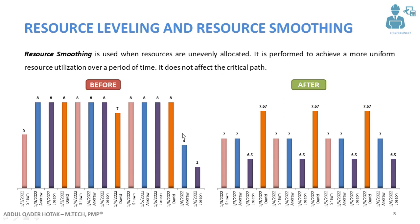Those three hours are added to the four-hour day, resulting in seven hours here, seven hours here, seven hours here, and seven hours here. The same is done for all other resources, so that all resources work for the same amount of time on each day.